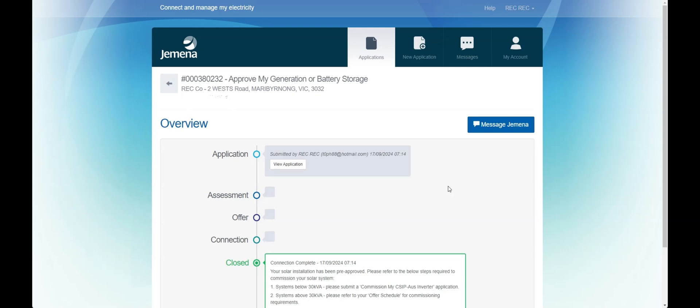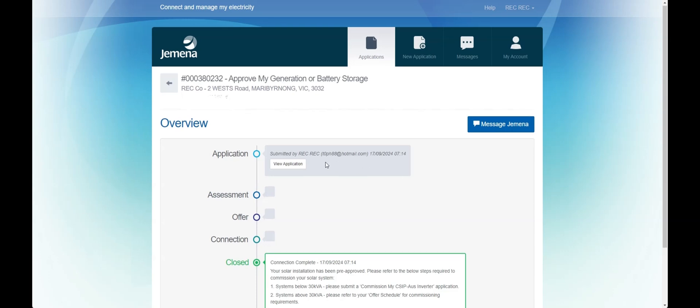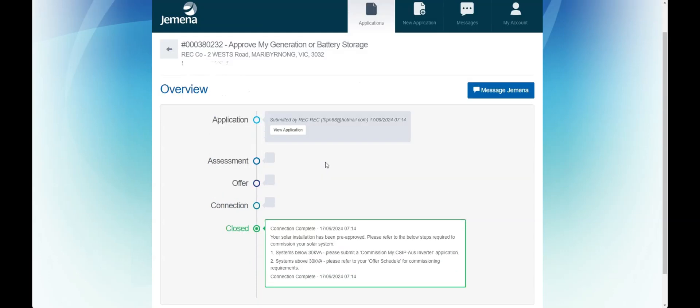If your system is less than 10 KVA per phase or 30 KVA in total you will receive an offer straight away. If it's above this size it will be referred to our team for further assessment.